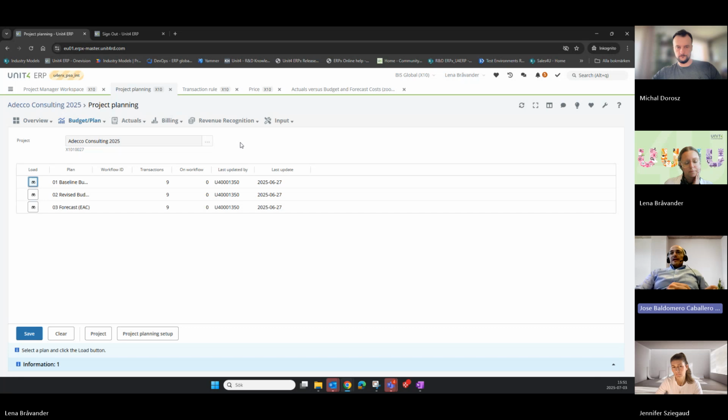And then second step, and this is one of the complexities, when the project is closer to winning, you will do the project resourcing, which is what we have with resource request. So for this task, I will need one guy. For this task, I will need 4 guys, for example, no? And then you will have the people, and then you can do a baseline with the people and so on, okay? What is the complexity? With the budgeting, we don't have a project planning tool. So for us, it will be quite difficult to have a budgeting tool without the project planning.